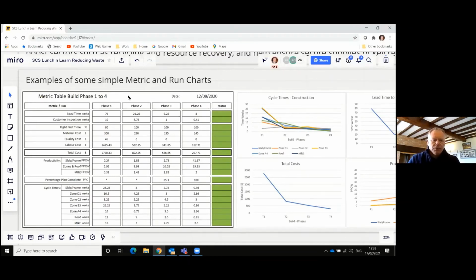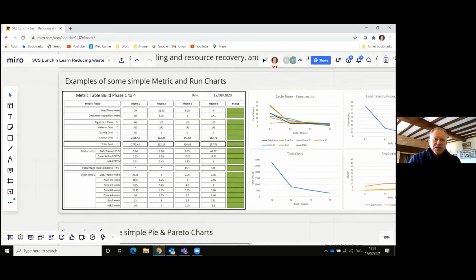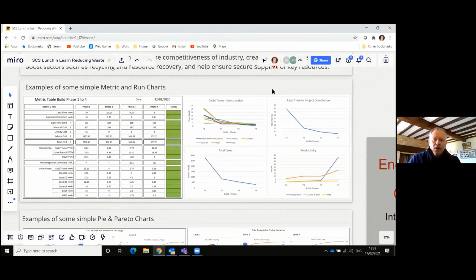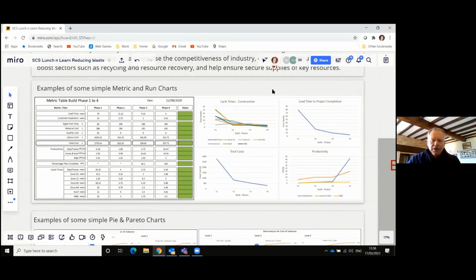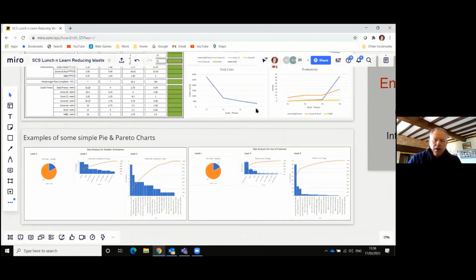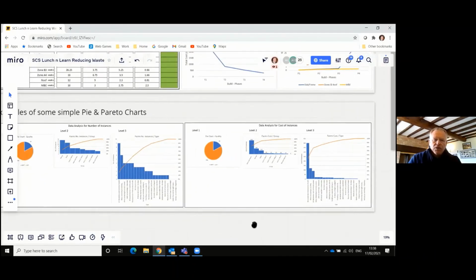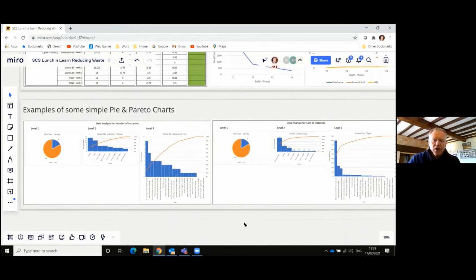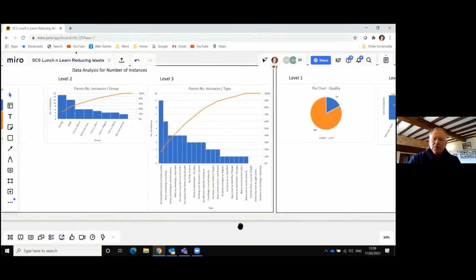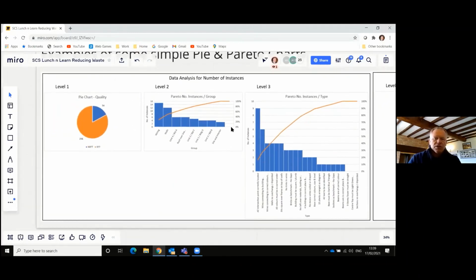As we start to improve, we can start to focus our thought processes around what's taking us away from plan. What was our percentage plan complete? And what do we need to focus on next with the removal of wastes? I've here now captured some examples around different levels of capturing information and data. So where do we focus our attention? We could use this process to think about the waste that we have on site. Where do the waste lie?